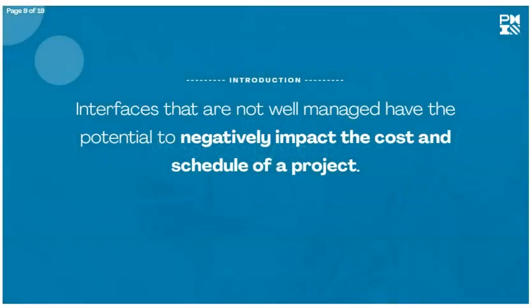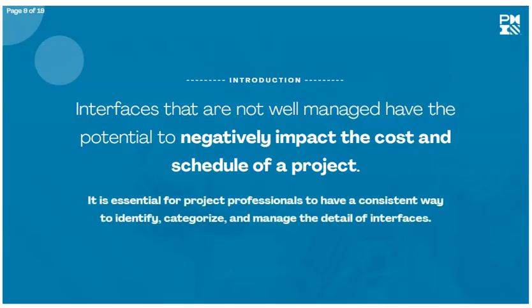Interfaces that are not well managed have the potential to negatively impact the cost and schedule of the project. As the number of different entities and scope of a project increases, so do the risks associated with each unmanaged interface. It is therefore essential for project professionals to have a consistent way to identify, categorize, and manage the detail of interfaces.